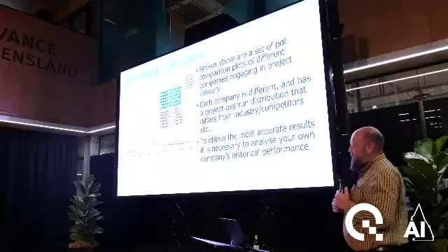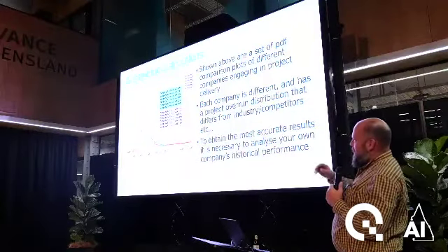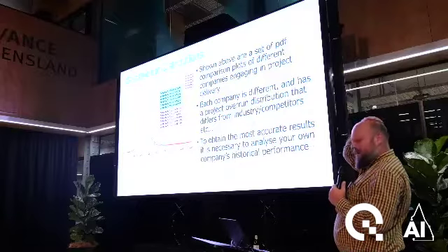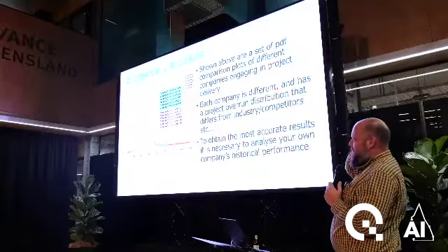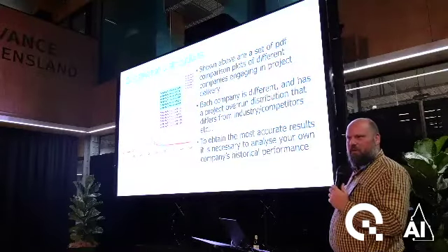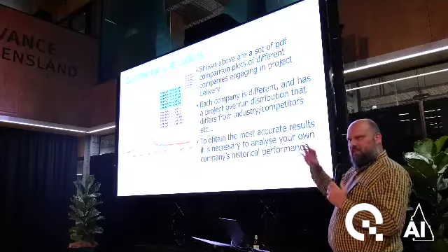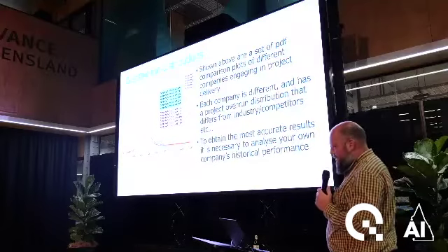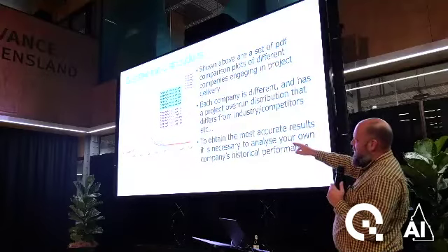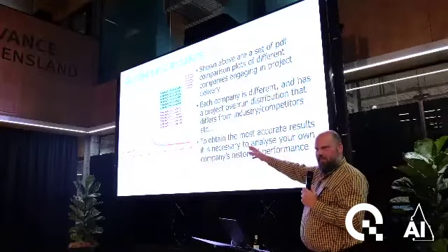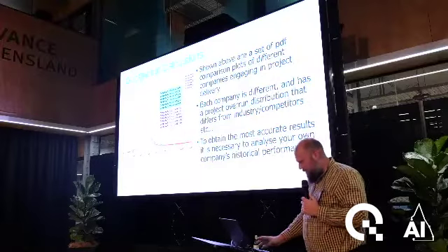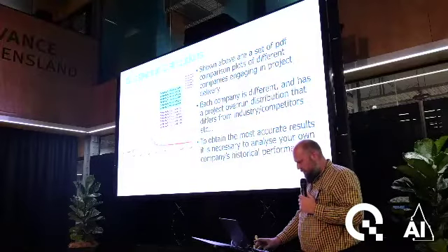Something I might mention now is that with this reference class forecasting, when they collect the data, those consultants are collecting data from many different companies on many different projects with different managers, different CEOs, different people that were operating on it. Whereas these ones that we have here are company specific. So we've got the idiosyncratic risk related to those companies in the data that we're collecting.